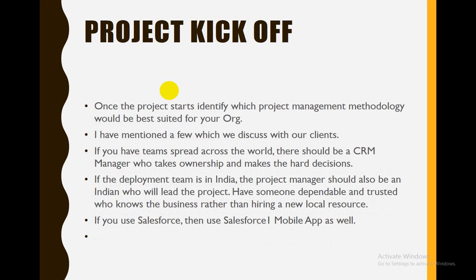Once you are ready, you've chosen your product, you've chosen your timelines, you know where exactly you want to go, once you know from point A to point B you want to go, you want to scrap off your old system and you are bringing in a new system, go for a project kickoff. This should be on a fixed date and a fixed time. Ideally, your project kickoff should also define how much work you want to do, what all work you want to do, who would be doing what work.